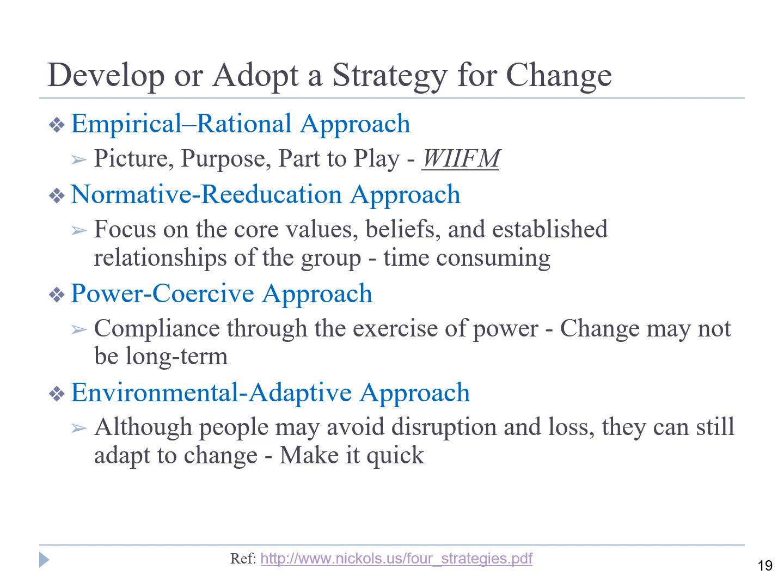And we had a very independent mindset in US courts, meaning that each court is very independent in terms of their operation. As such, there were many approaches for doing similar activities in different courts. So to make that change, we had to change the values, the norms in those organizations. So we formed an advisory group from the executives from those courts, essentially the clerk of the court, who's the chief operating officer of the court.